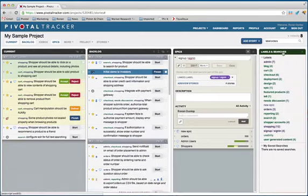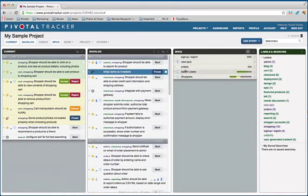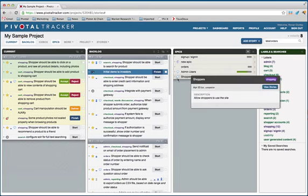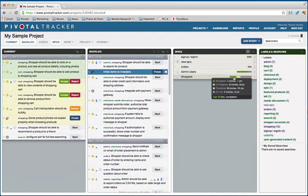You'll also see when you are looking at Epics, we've got this great progress bar. In this case, the shoppers Epic, which has conversation, also has a portion of its work already done. And if you can see this on your computer screen in this video, you'll note that this has seven accepted points and five stories, four points in progress, and eight stories that are prioritized but our work hasn't started yet. This also gives us an estimated completion date based on your iterations of April 23rd.